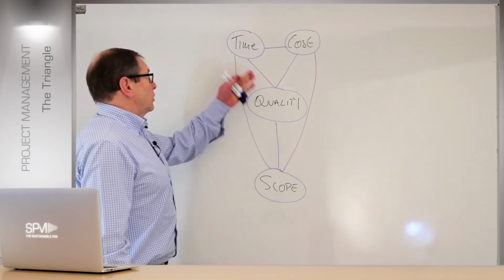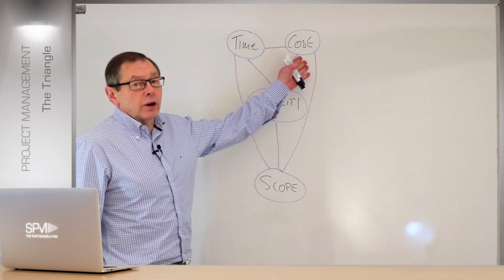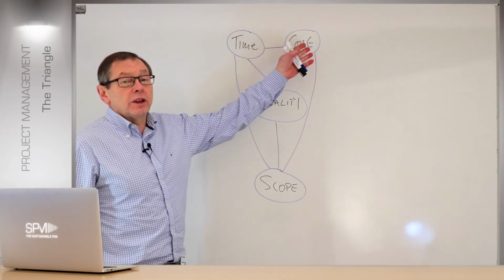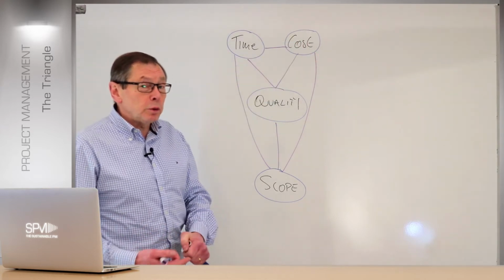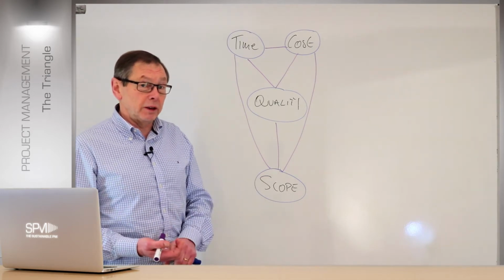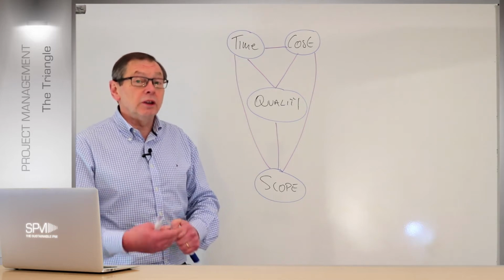Right? And we have a time frame that we need to do that, and it costs around that, right? Because the business needs it done in a certain time, and we have a cost that we need to keep under the budget. Remember, there's a difference between budget, that which we have allocated to the project from a business perspective, and the cost, that amount it's going to take to build the solution and deliver it.